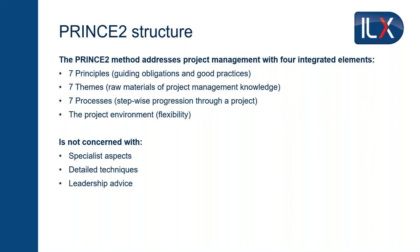This is not one size fits all. It's about tailoring — making it appropriate. What's the right size? If you have a small project with low risk, you might have a very light touch of PRINCE2. If you have a big, daunting project, you might require a lot more. PRINCE2 suggests you're trying to avoid two extremes: robotic project management, where you take everything from the manual and throw it at your projects regardless of size, which is overly bureaucratic and very slow; or heroic project management, where you use nothing and rush from crisis to crisis putting out fires. Somewhere in the middle is the appropriate balance, giving you a controlled start, controlled progress, and a controlled close.